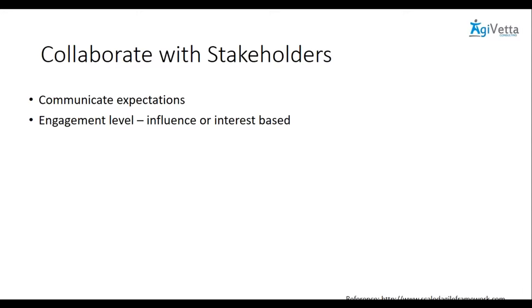What about people who have high influence and are available also? Product owners, product managers, architects, development managers, line managers. They're available all the time and they also influence a lot of activities that go inside. Now, that kind of people, they need to be strongly involved. They need to be very much involved in planning sessions, demos, retrospectives, inspect and adapt sessions. They need to be really much involved.